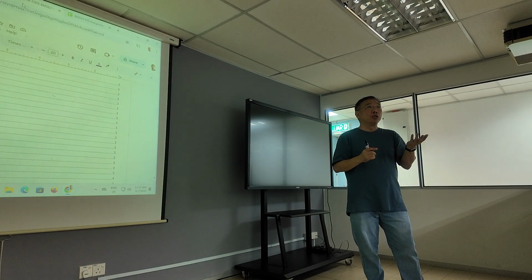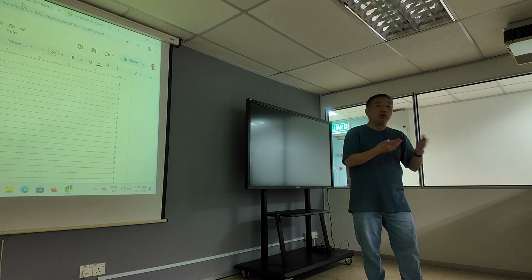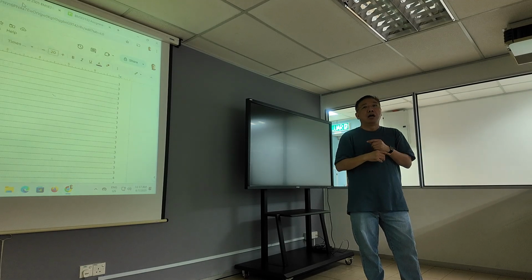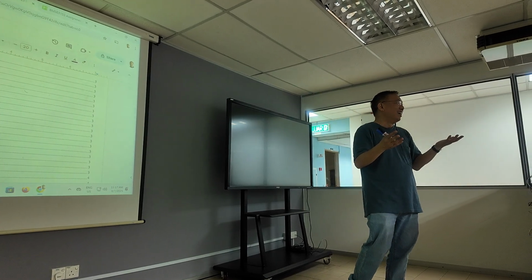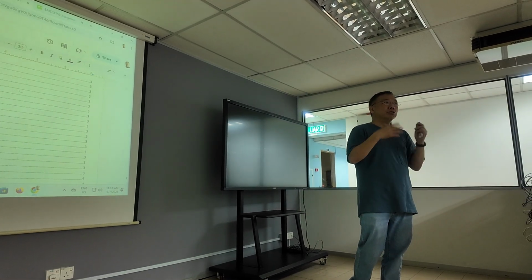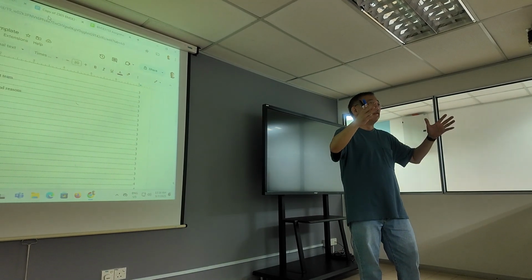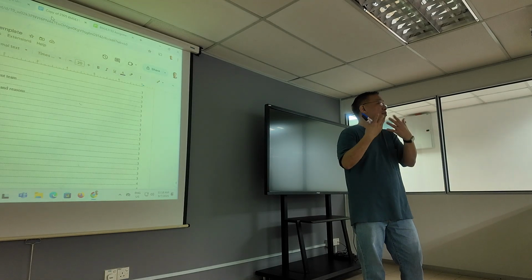Another example could be documentation. Documentation will not be provided in hard copy, it will all be soft copy only. So it will be very clear to the client. User training. Okay, most projects will have user training, right? But you might want to say that the user training will be conducted just for the existing employees only. No future training for new employees will be provided as part of the project.